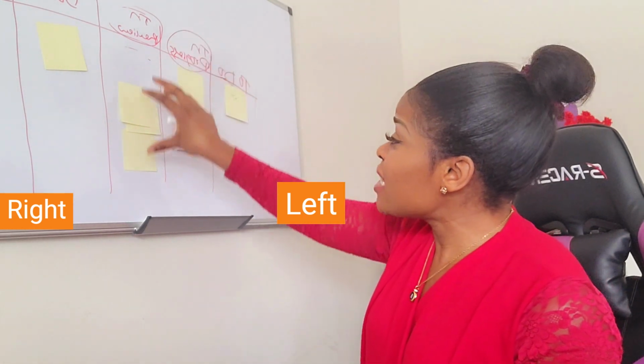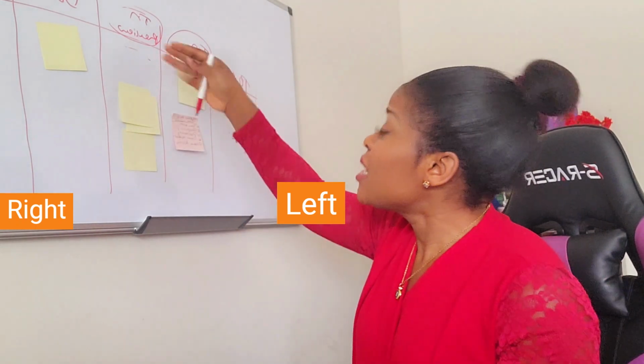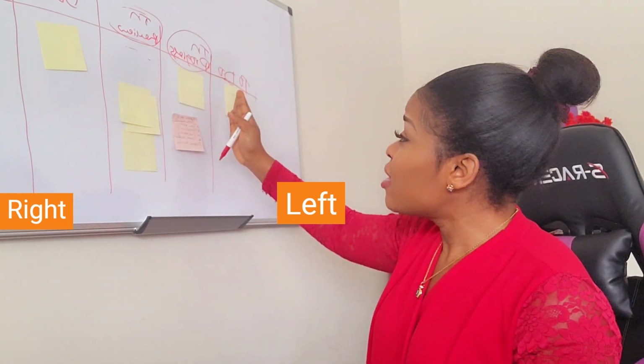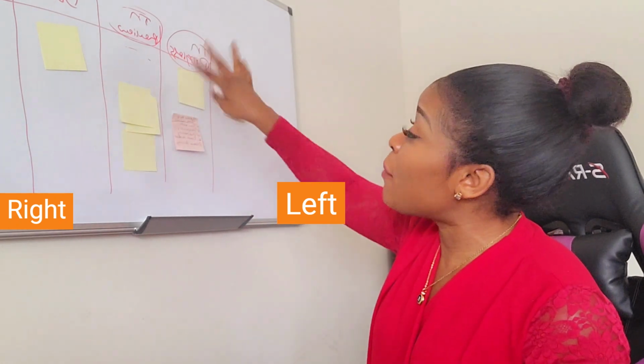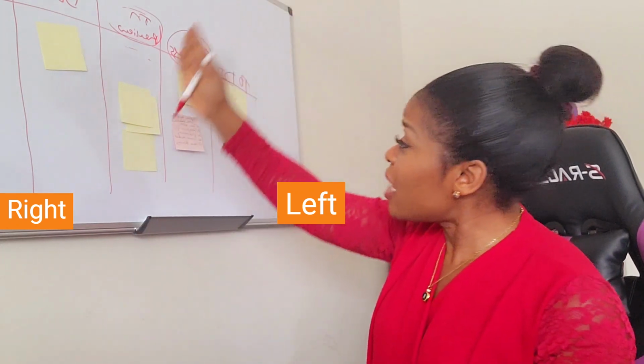If I see that we are beginning to have so many things open here based on our WIP limits, let us discuss them, let us address them, and then we are moving all the way. You see, instead of just talking randomly about, oh, yesterday I did that, today I plan to do this, and these are my impediments. No, let's talk about this.